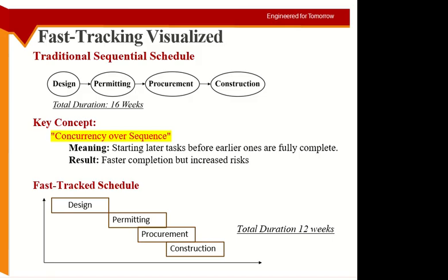So you may say, okay, I have submitted the file. Usually if there's something wrong, they return it within 2 days. So you may wait for 2-3 days. If the file has not returned, now you know that it is going to be approved, but it will take time. So I will not wait till the end when the approval comes. I know within 2-3 days the file did not return, that means everything is fine, I can move ahead. Now you can go to contractors with your design, saying this is the design and this is what I want to be constructed. This is the procurement stage.